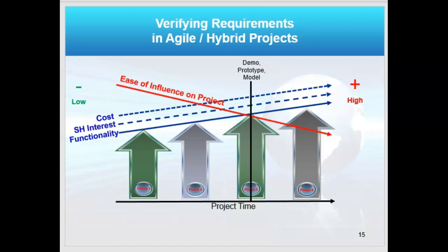Now, you want to be careful when you're collecting your requirements, because if a requirement is not found early in the project, it is very expensive later to make the change, right? And look, at the end of the project in phase 4, it is not easy to make the change. It has a high cost, stakeholders get very interested, and it complicates the functionality.